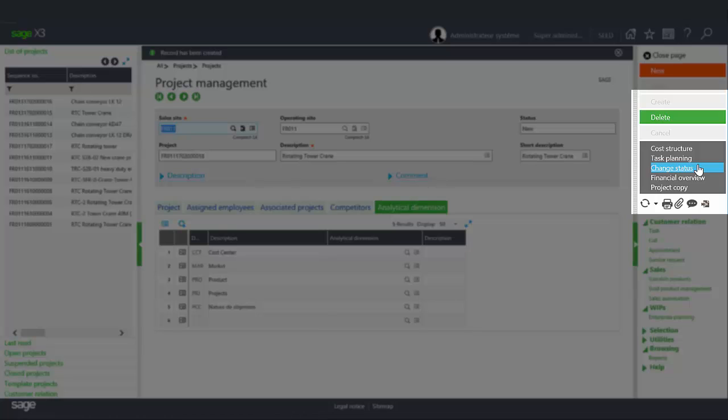The change status button allows you to change the product status and even reactivate a closed project or a suspended project. The financial overview button allows you to access the financial follow-ups of the project and to compare actual expenses and planned revenue to the budgeted costs.